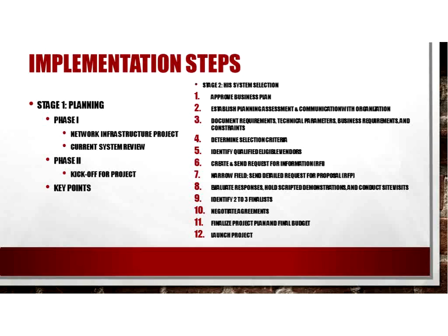So that process is intended to gather information about each of your vendors and make an initial assessment without spending too many resources. And so you're going to use that to narrow your field down to maybe 7 or so vendors who you're going to in turn send what we call a request for proposal, and they'll have the opportunity to propose their system.